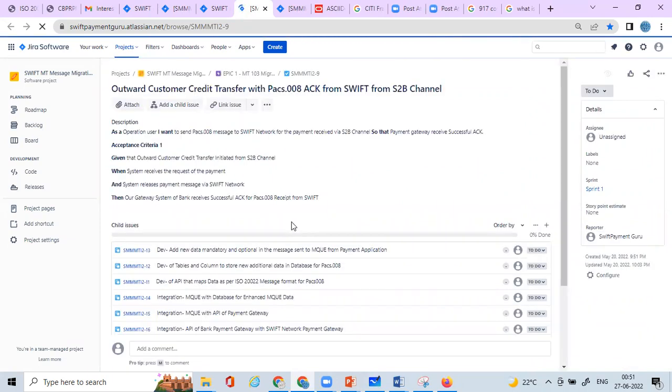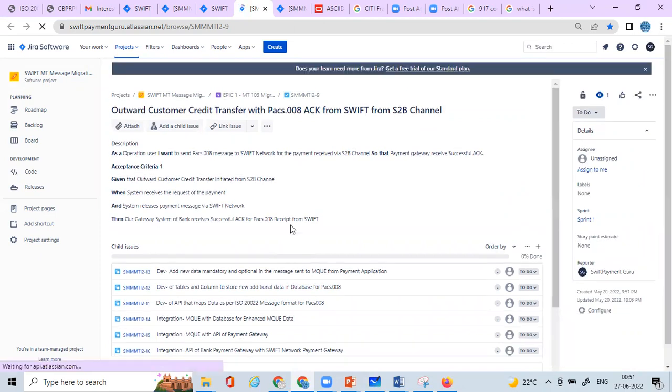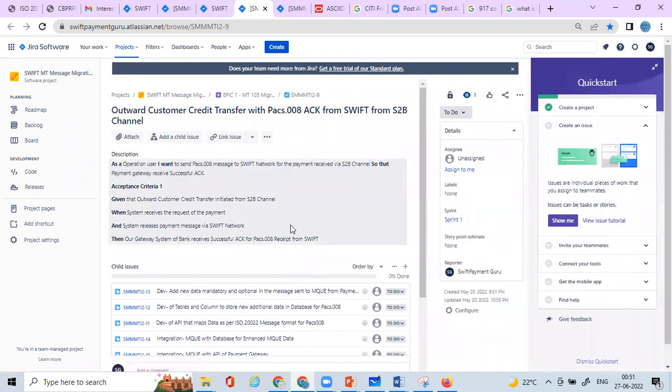And depending upon your bank's requirement, you can break it up into multiple user stories for one epic. And once the entire user stories are done, then you can mark epic 1 as closed, and you would anyway demonstrate it during the sprint review and demonstration, right? That time you would do it. Not necessarily that epic 1 needs to be completed in sprint 1 itself. It can be a continuation to sprint 2 and 3 if it is very long, but it is all based on the priority, how soon it needs to be delivered. Based on that, you would do it.